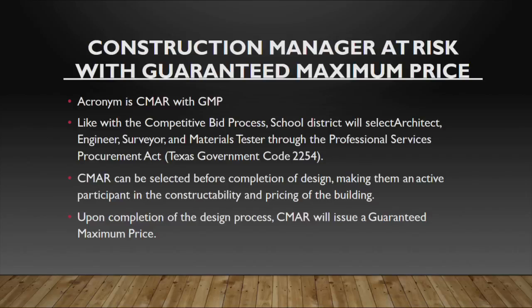And finally, we've got the construction manager at risk process. With the CMAR, the reason why there's an at-risk associated with this is because a CMAR is going to take a gamble. At some point, they're going to receive a set of designs, and they're going to tell the school board, hey, I can build this for $100. And if for whatever reason steel triples in price or something happens, they need to keep their word. They need to make sure that they're going to build that building for $100, no change orders, no nothing.